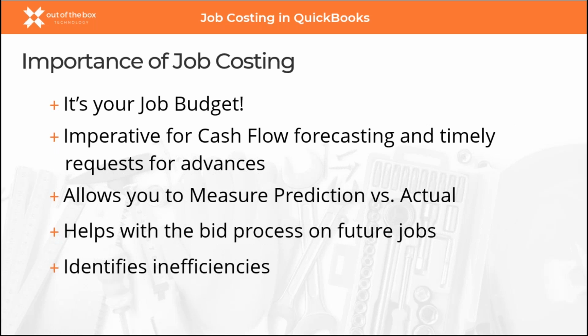So why is it so important? It is your budget, and it will keep you informed. If you set it up in QuickBooks correctly, or whatever accounting system has that type of functionality, it will help you with cash flow forecasting and help you know when you should be asking for more money from your customer. If it's a long-term project, you don't want to be upside down in your cash flow.